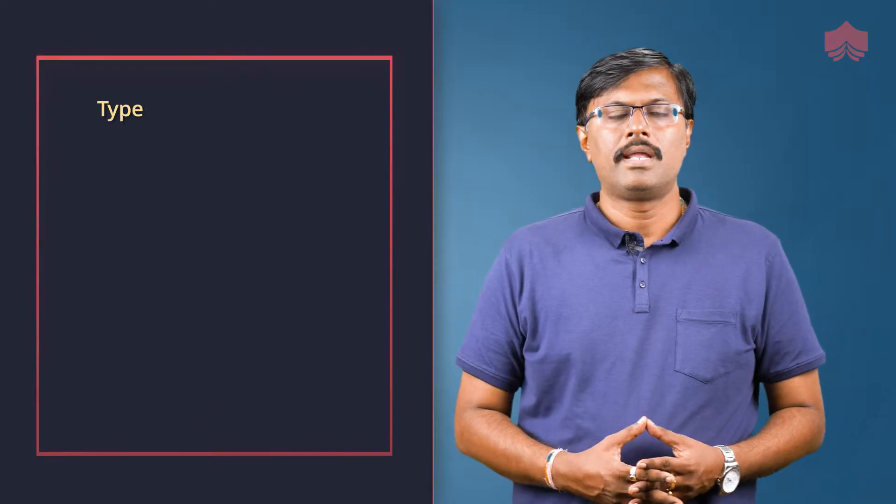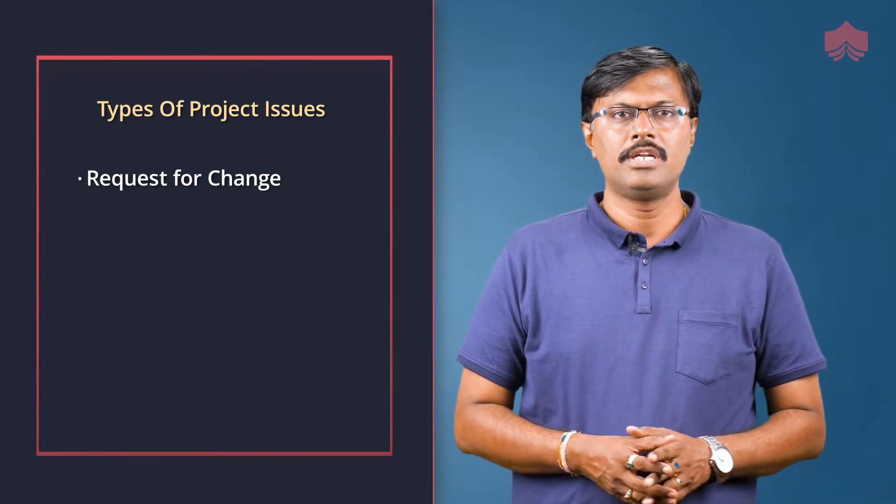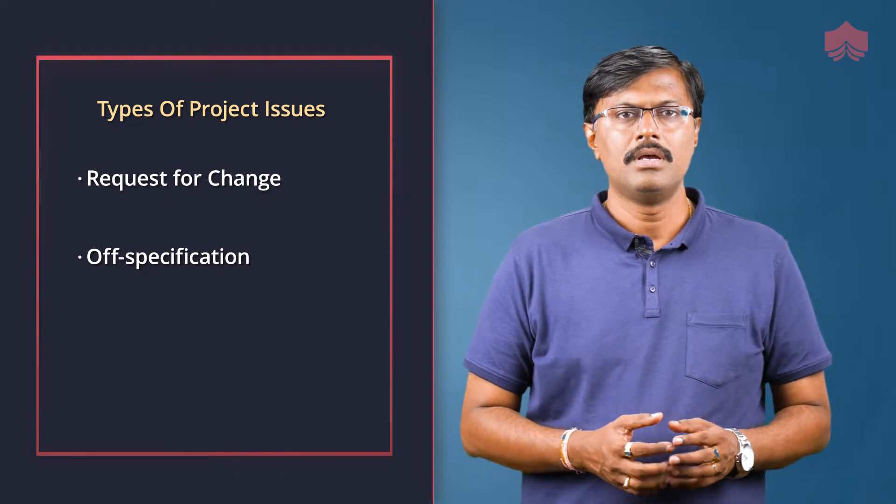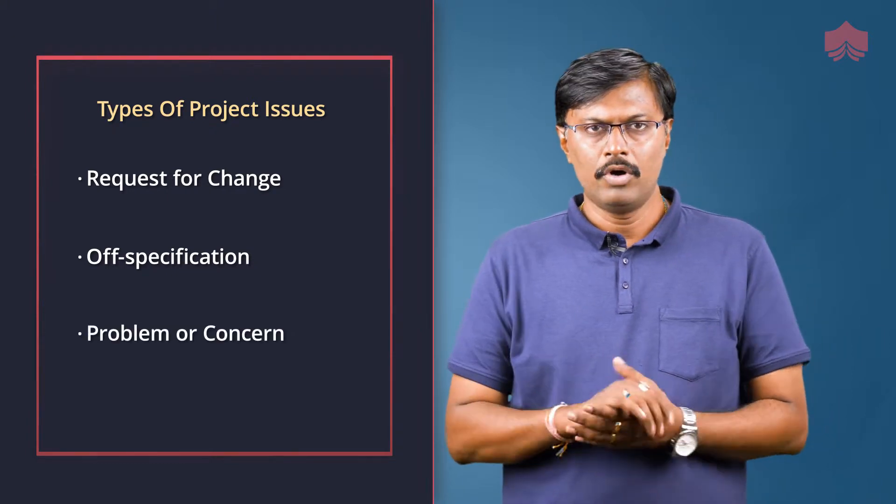Issues refers to any relevant event that has happened, was not planned and requires management action. Issues may be raised at any time during the project. They can be raised by anyone with an interest in the project or its outcome. Types of issues can be: request for change, off specification, or problem or concern.